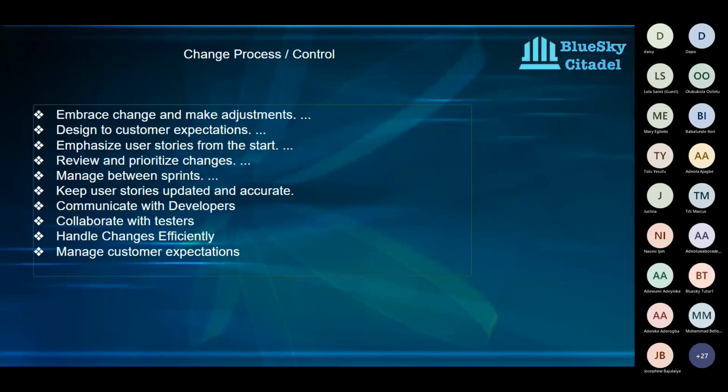And then you communicate that back to the stakeholder or the product owner to say, we're happy to take this in. I've checked with the team. We've broken this feature, this requirement down. It's something that we can actually work on within the sprint. Or I might go to the stakeholders or the product owner and say, we're happy to take this into the sprint, we've broken it down and the guys have looked at it, but we will need to deprioritize one of the stories that we've already taken into the sprint to accommodate this. So of all of the stories already in the sprint, which ones would you deem the least priority compared to this new one and the other ones within the sprint?